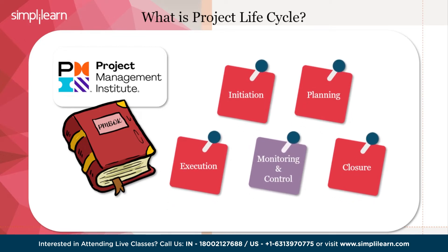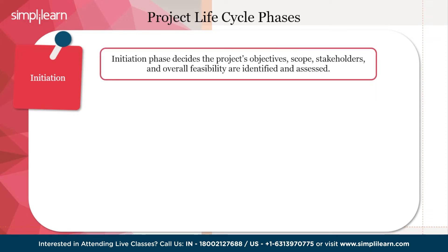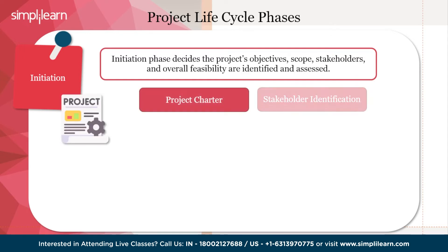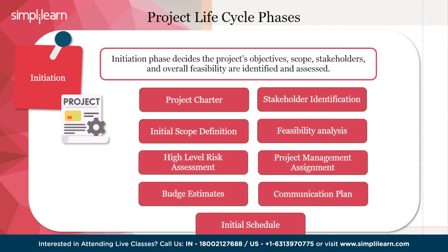Moving ahead, we will dive deep into these five phases of the project lifecycle, starting with the first phase: the initiation phase. The initiation phase is the first phase in the project lifecycle. During this phase, the project's objectives, scope, stakeholders, and overall feasibility are identified and assessed. Activities include project charter creation, stakeholder identification, initial scope definition, feasibility analysis, high-level risk assessment, project manager assignment, budget estimates, communication plan, and initial schedule.